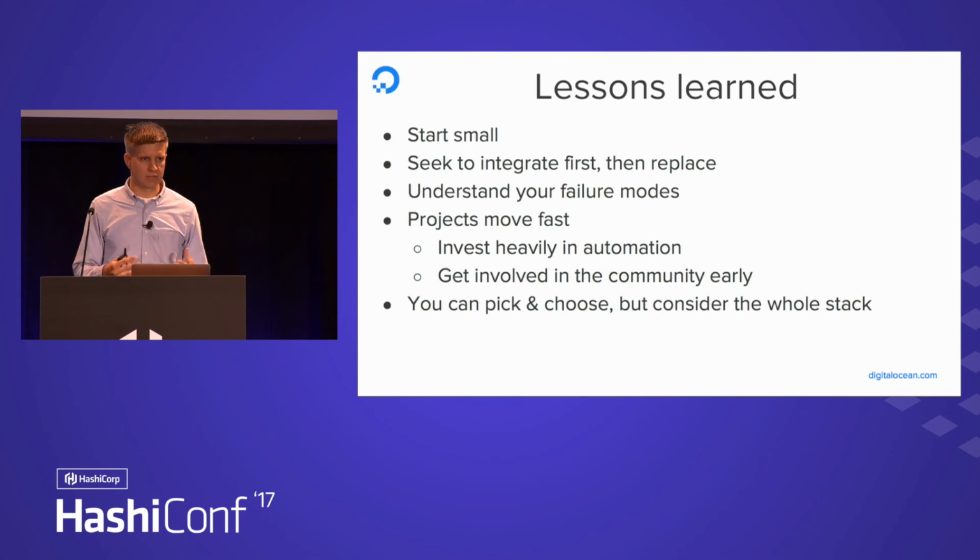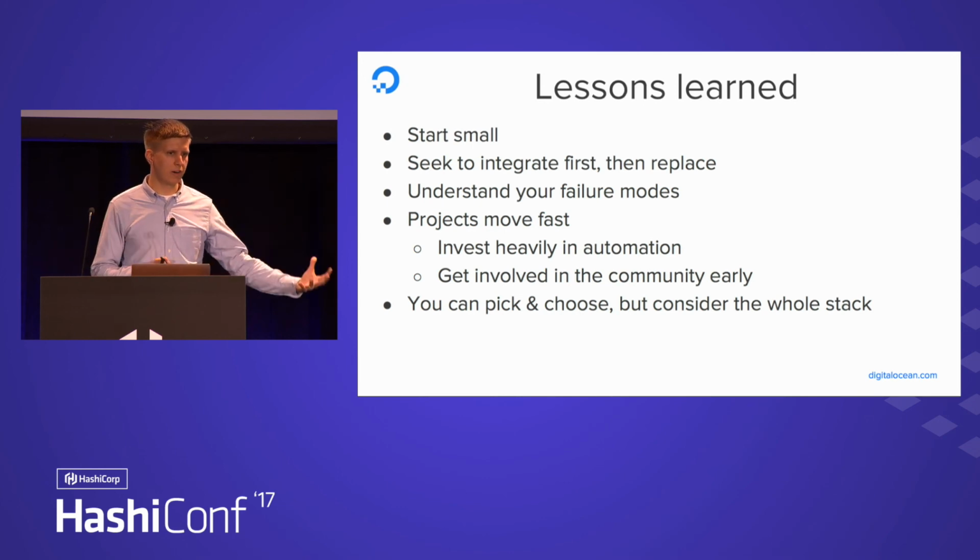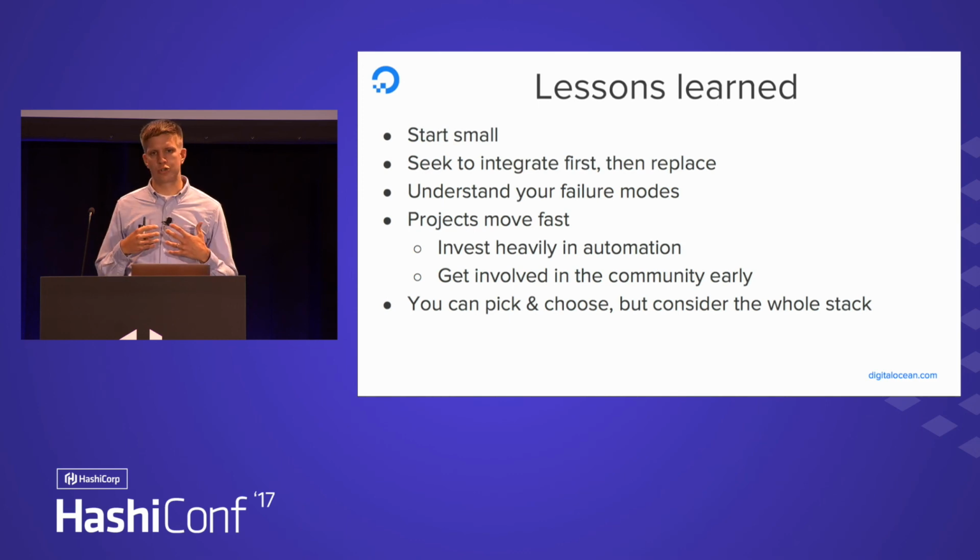We have had some very ambitious projects, rolling out a tool and only learning, maybe halfway through the rollout, that it doesn't quite work for the scale that we hoped for, or maybe we didn't configure it in a way that does the right thing. So I encourage you to start small if you can. Get a pilot, start off with one project, and then as your confidence grows, increase the adoption and keep rolling.